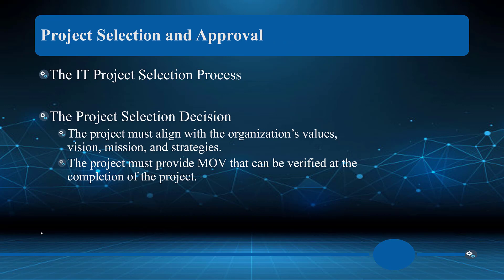To finish: the IT project selection process requires that the project aligns with the organization's values, vision, mission, and strategies, and provides a measurable organizational value (MOV) that can be verified at project completion. I'd also suggest setting a time to re-audit and confirm that the project is resulting in the expected revenues and benefits a year later — because if the market changes, adjustments may be needed. That's it for Chapter 3 — I look forward to seeing you for Chapter 4.